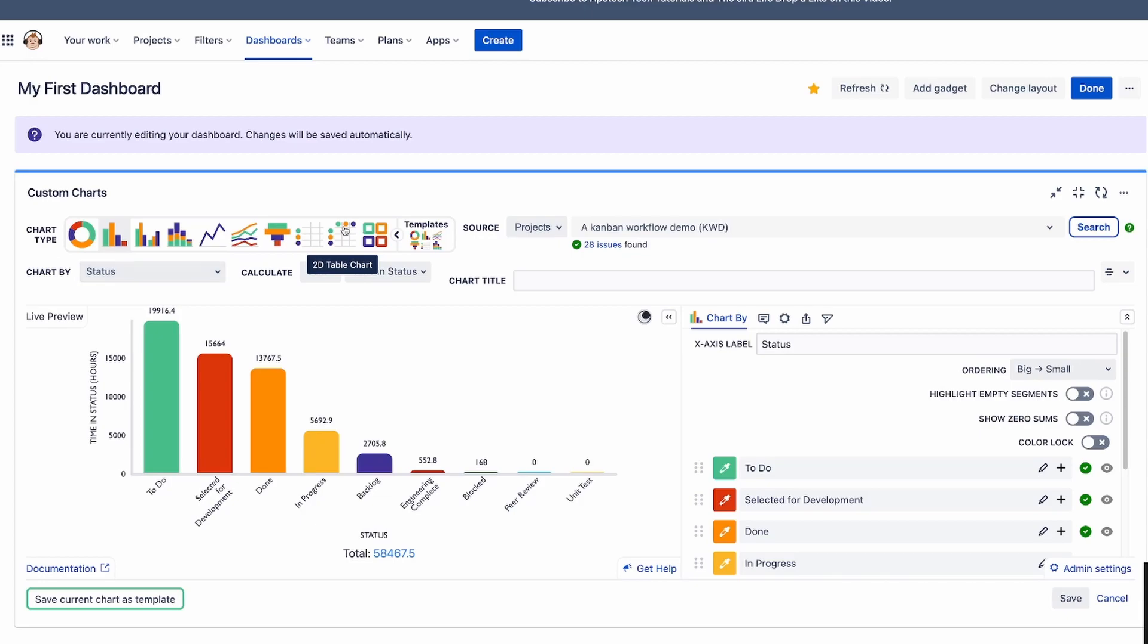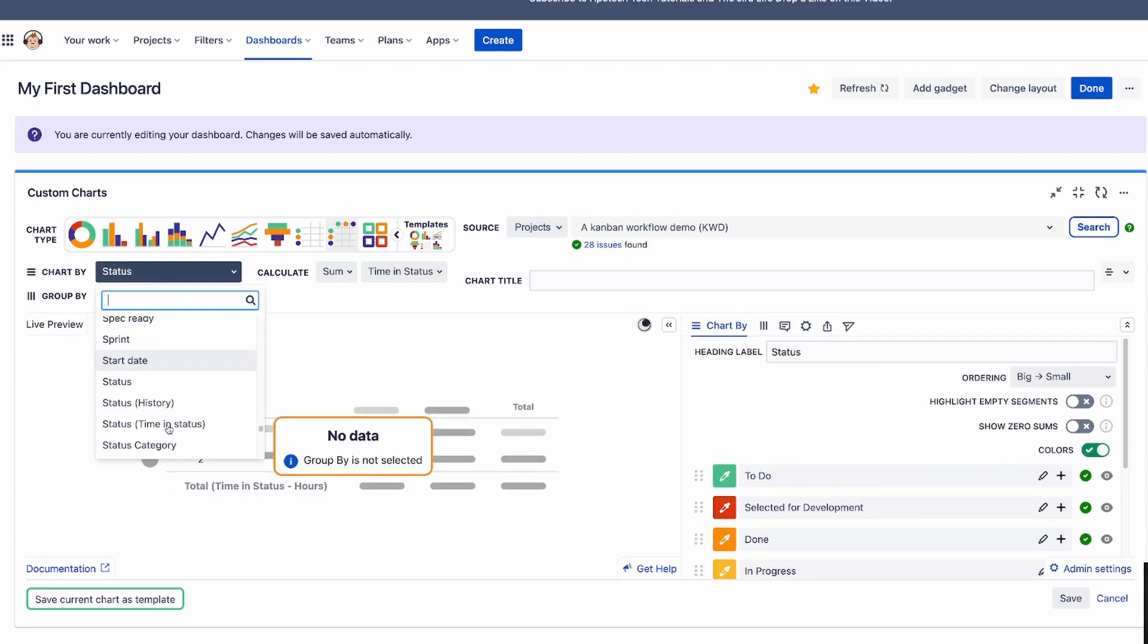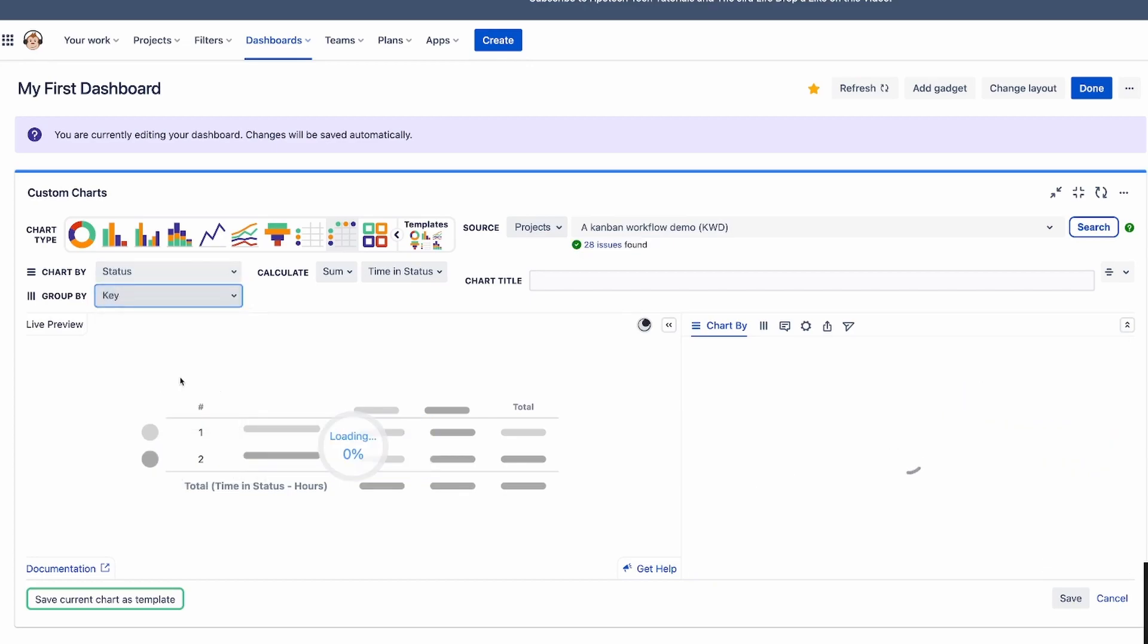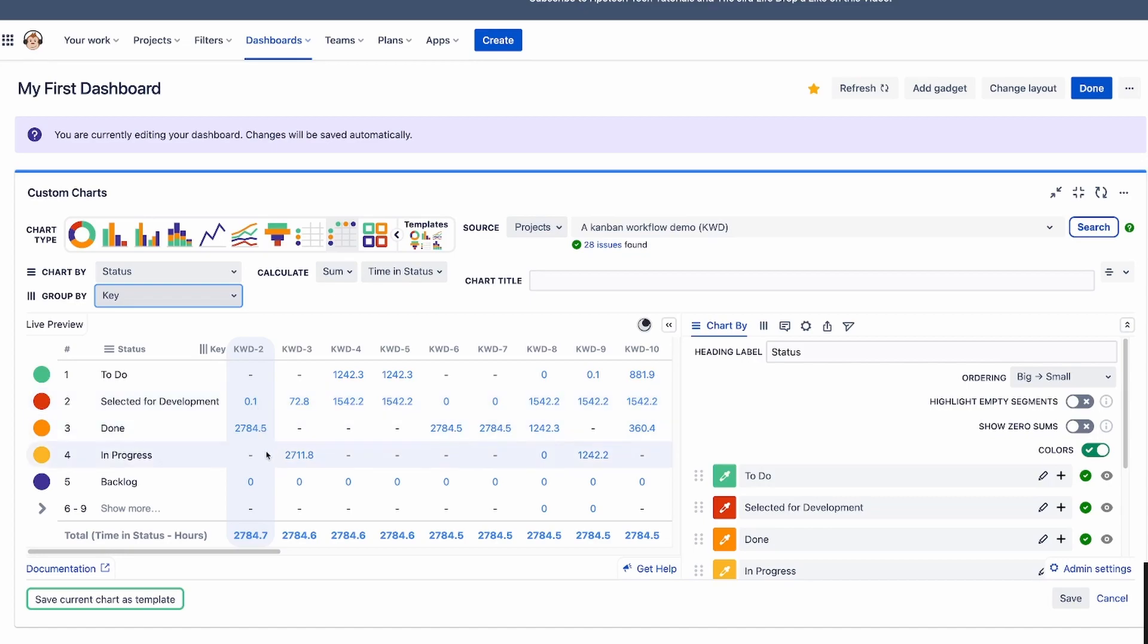This is going to show you all the issues that have been in to do and how long they've been in there, but maybe you want to see a breakdown. So in that case, I would recommend you to use the 2D chart, use the same time and status here, but then you put like the key so that you get the individual issues. This is going to work well if you have like a few issues, but if you have too many issues, it might not work out very well, but this is probably the view you're going to want. This is going to tell you each issue and how long it's spent in each status. Now, if you're looking at this and you're like, whoa, those are some really, really big numbers.